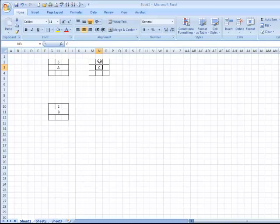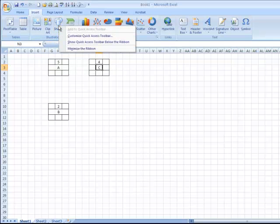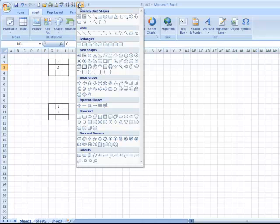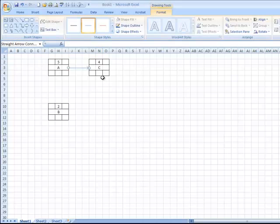In this project, keep in mind, both activity A and activity B have no immediate predecessors, which means the project can start with either A or B. On the other hand, activity C follows A and A only, so we are going to add an arrow pointing from A to C. To do that in Excel, select Insert and look for Shapes. A better way is to right-click Shapes and add to Quick Access Toolbar. Click Shapes, select the arrow, and draw an arrow pointing from A to C — meaning activity C follows A.